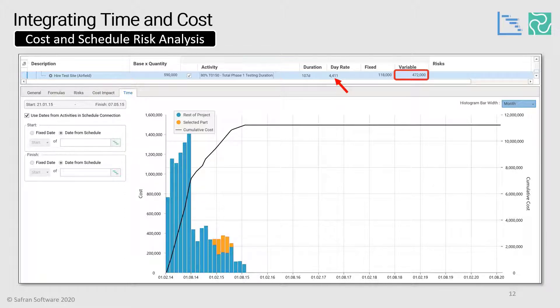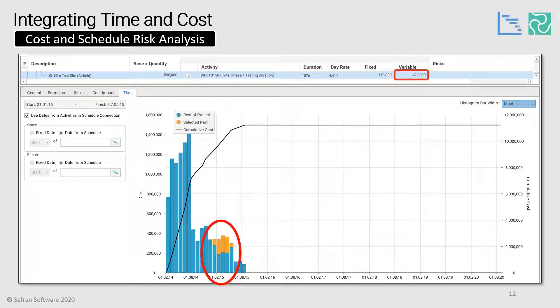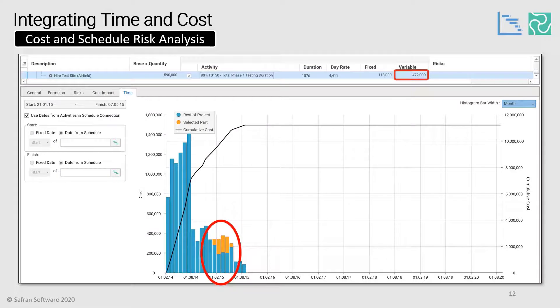So for every day beyond the deterministic data, it will cost this much more. And for every day saved, it will save this much money. And we can also see, because we've mapped it to the cost activities, that this cost is going to be incurred here within our deterministic cash flow profile, which you can see moving around with each iteration of the step through feature of our Monte Carlo, or you could use your probabilistic cash flow report instead.